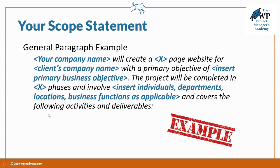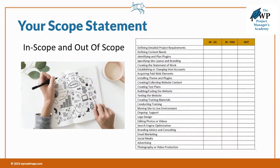After that, the way I break it down is with a chart, which makes it much easier. These are activities from the project plan. Notice there are three columns: 'In Us' — the people writing the proposal — 'In You' — the client — and 'Out.' I put an X in the proper column for this particular project. This is not an exhaustive list; your list may look quite different, especially if you're not doing training. You may still want to list items like training and put them as out of scope so the client knows for sure.